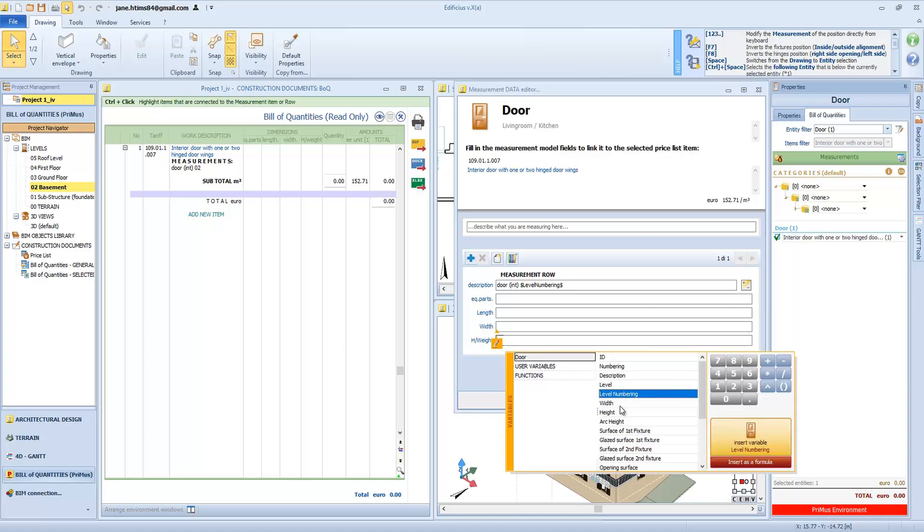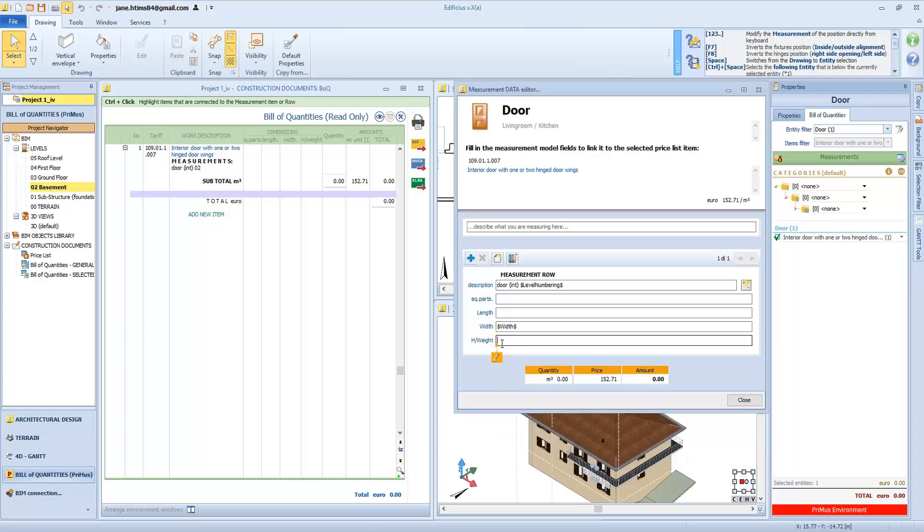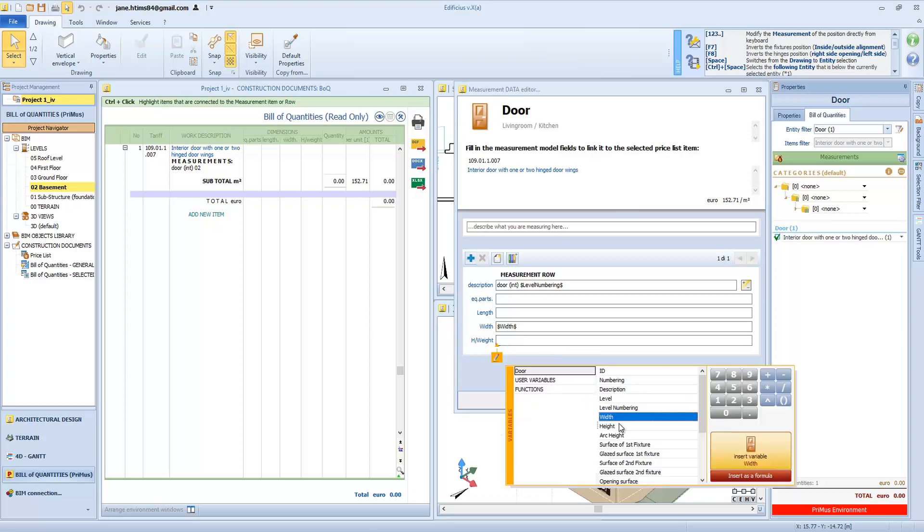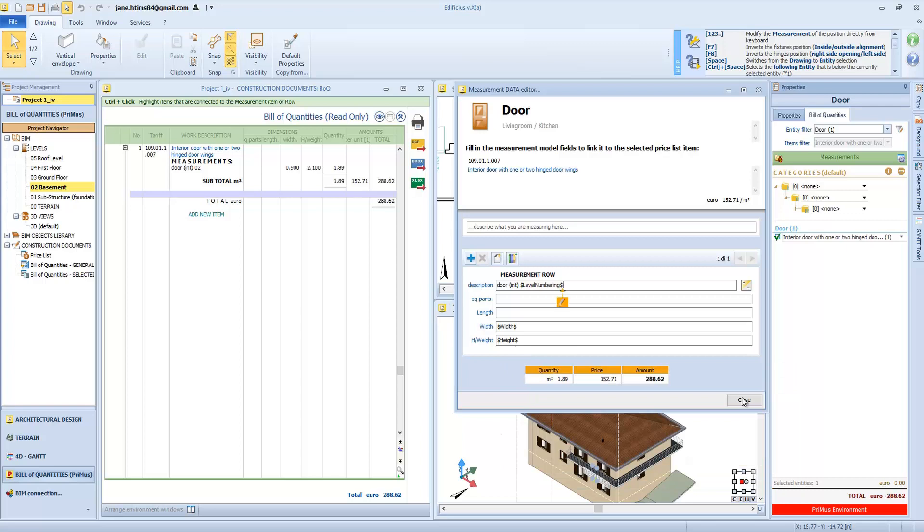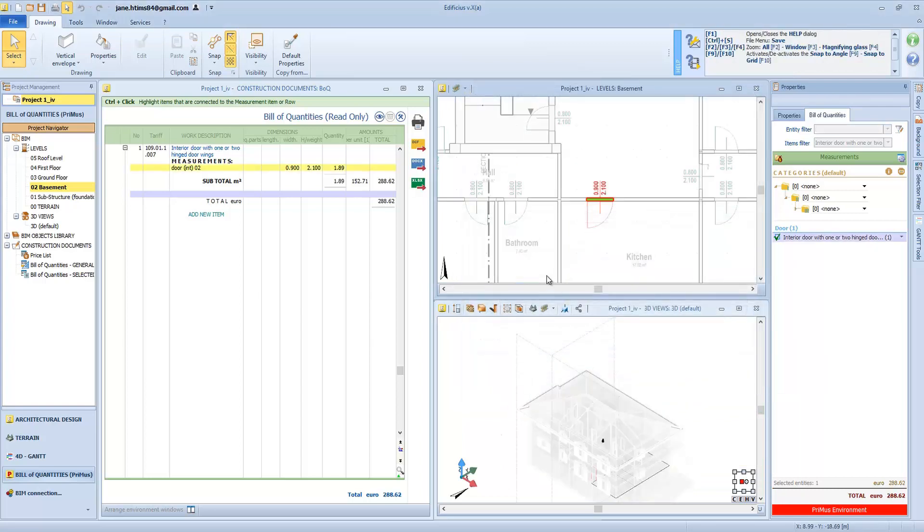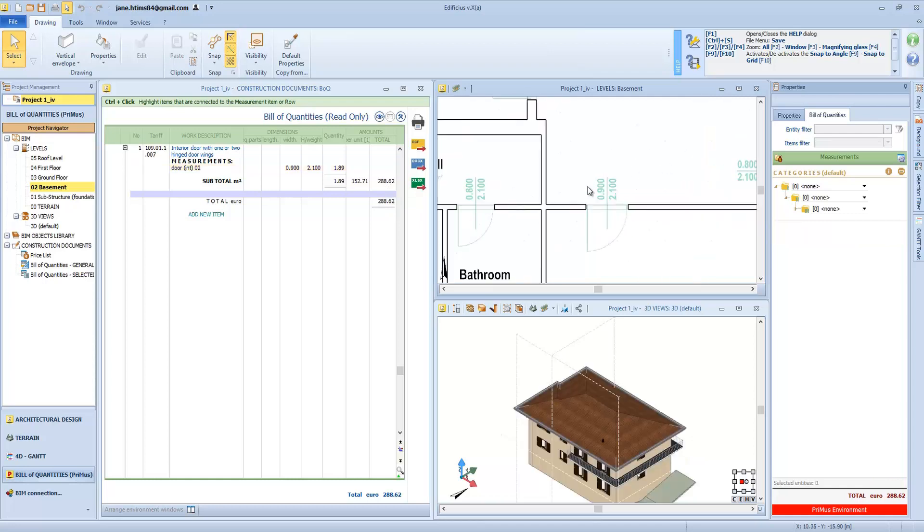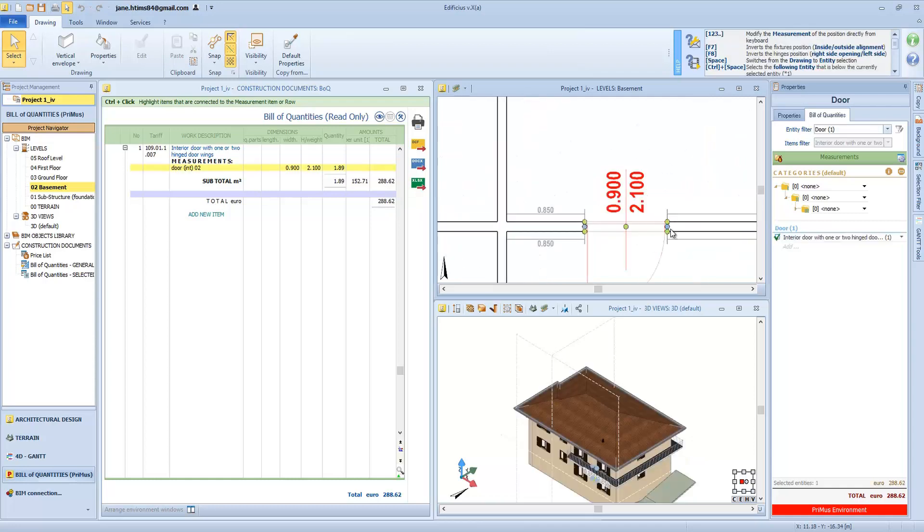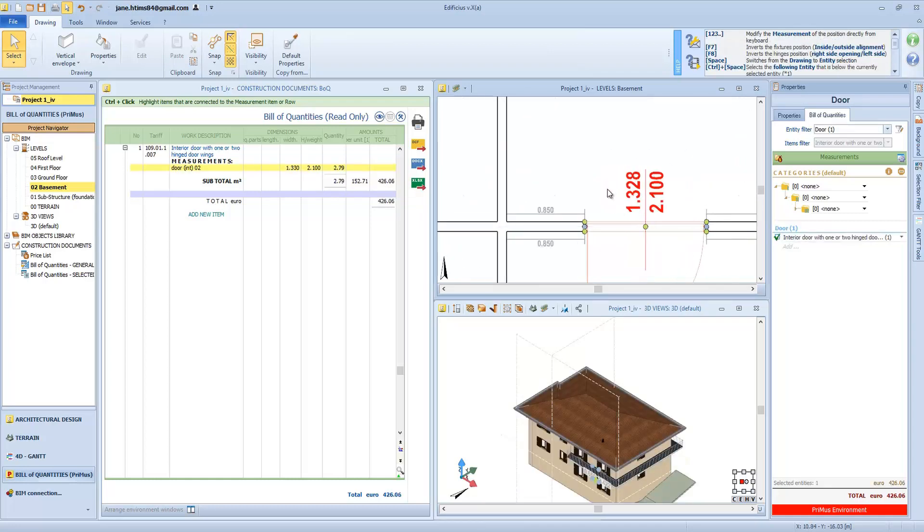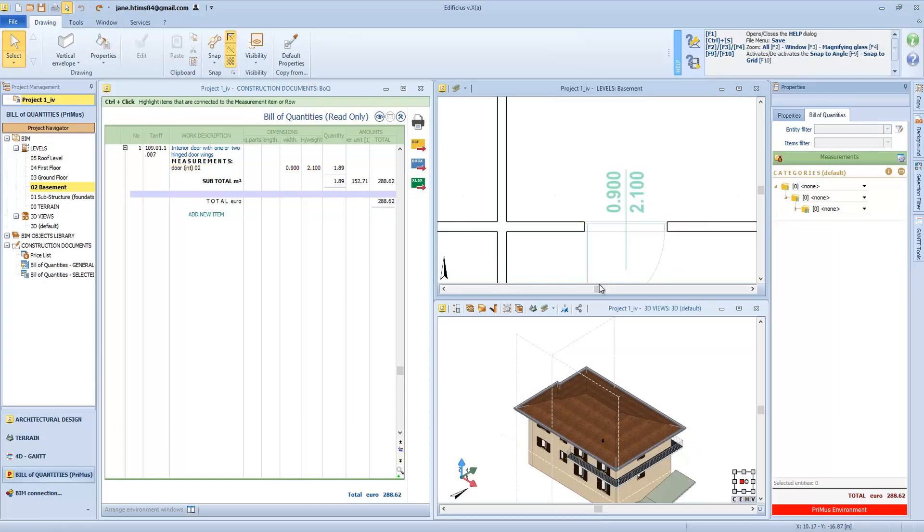For example, here we want the door width variable. We click on this button and choose the width, and then proceed in the same way for the height value. At this point, the quantity is multiplied by the unit rate and will give us the total amount. A click on Close concludes the quantity takeoff and surveying for our door. When we link a drawing entity to a price list item, this basically means that there is a direct correlation between BIM models and cost model, so whenever the 3D model of our building changes, so will the cost estimate, keeping everything aligned even in terms of cost and measurements.